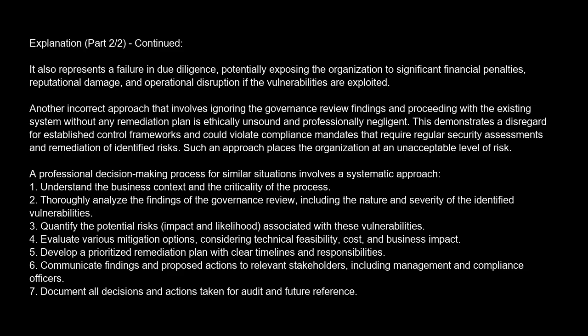Evaluate various mitigation options, considering technical feasibility, cost, and business impact. 5. Develop a prioritized remediation plan with clear timelines and responsibilities. 6. Communicate findings and proposed actions to relevant stakeholders, including management and compliance officers. 7. Document all decisions and actions taken for audit and future reference.